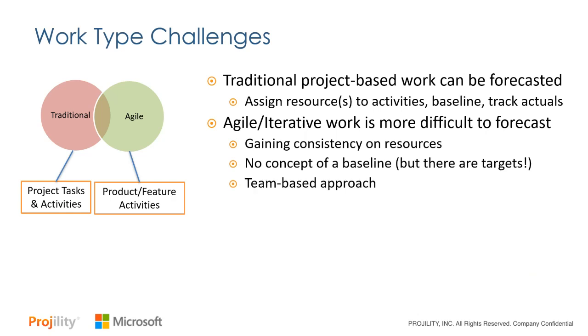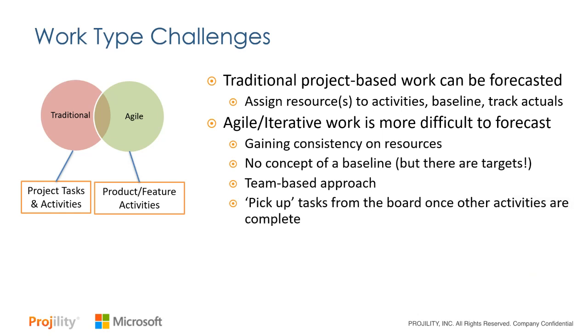And additionally, we're using more of a team-based approach where we're taking different individuals to work on a specific task versus having one or two people just work towards that specific milestone or deliverable. They're building something or they're working towards something. And then the nature of Agile work, really driven by Scrum, is picking up tasks. You go in and you do your daily stand-up, you pick up tasks or activities, maybe you worked on them the day before, or you have some availability, you're going to pick up new tasks, you move them over into the board to in progress, you work on them, and once they're completed, you move them over to done.